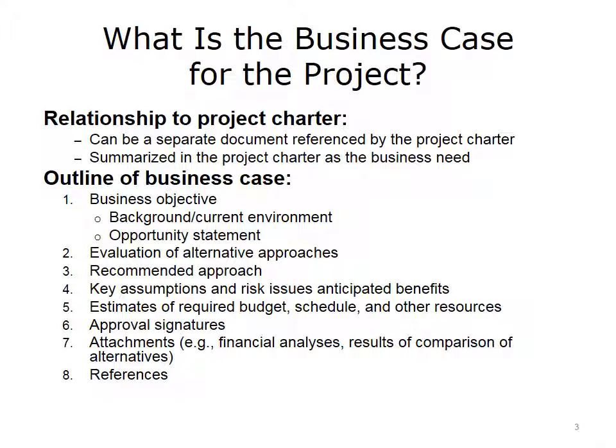What are alternative approaches? What is the recommended approach? What are some of the assumptions and risk issues? What is the project going to do in terms of benefits compared to the cost of the project itself? This is the place where you can have a return on investment and cost-benefit analysis consideration as part of the business case. There needs to be some reason for undertaking this project that improves your operation.